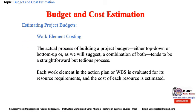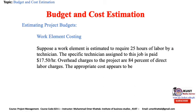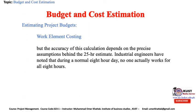Work element costing is the actual process of building a project budget — whether top-down, bottom-up, or a combination of both — and tends to be a straightforward but tedious process. Each work element in the action plan or WBS is evaluated for its resource requirements and the cost of each resource is estimated. For example, suppose a work element is estimated to require 25 hours of labor by a technician paid $17.50 an hour, and overhead charges to the project are 84% of direct labor charges. The appropriate cost would be: 25 hours × $17.50 × 1.84 = $805.